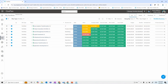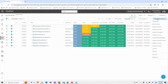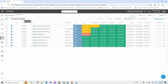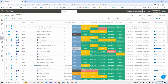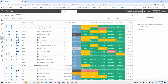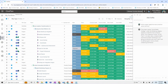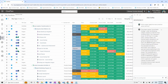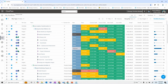In the portfolio summary view, I can come in and ask Sophia: 'Which project needs the most corrective action, and why?' This is real-time information, leveraging what it knows from its language model and what we've trained it on in this discipline. Sophia says social media strategy is its choice because it's off track in a number of different dimensions — off schedule, and its budget against the benefit shows excessive costs and reduced benefit, which is generally not a good indicator. It gives me not only its choice but the rationale behind it.